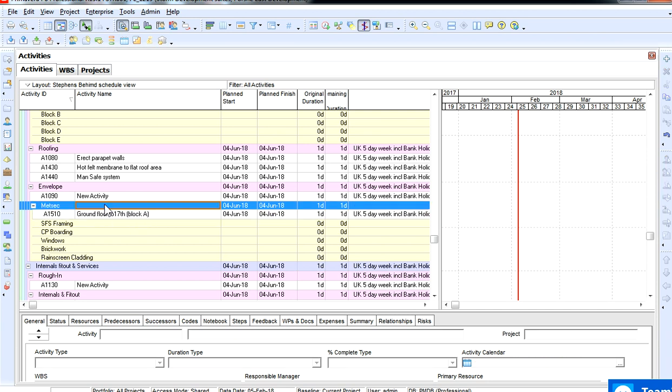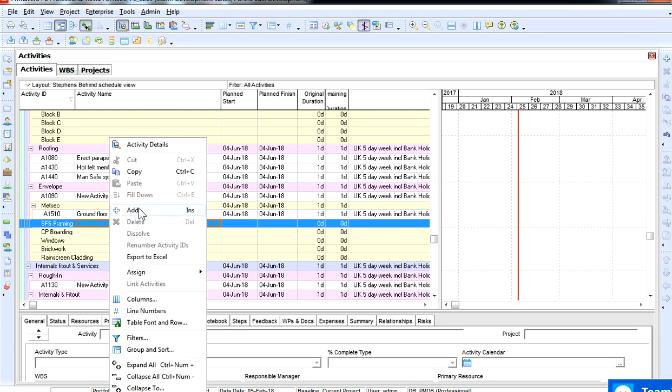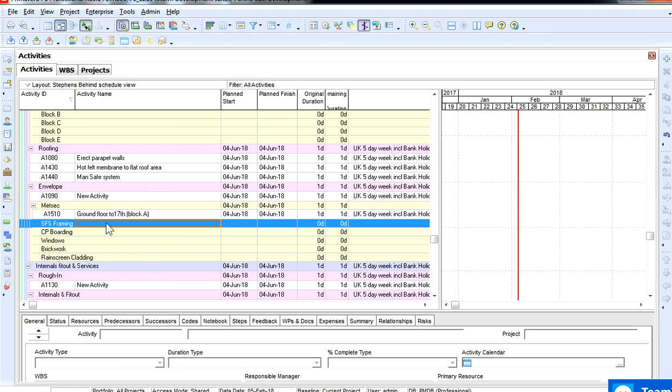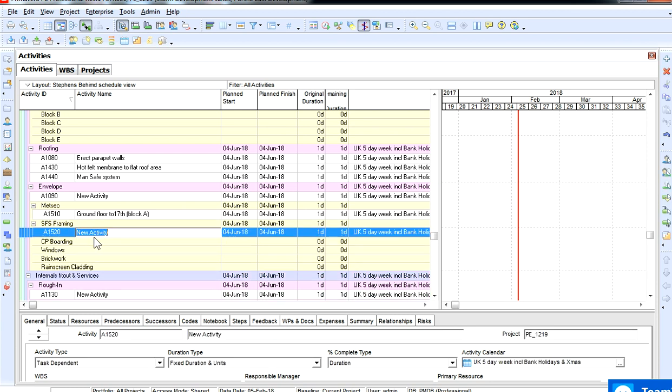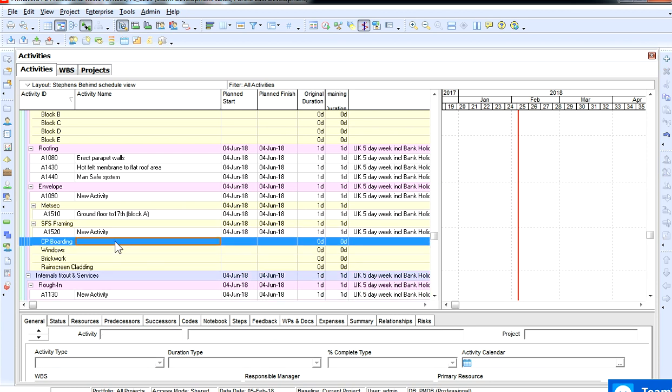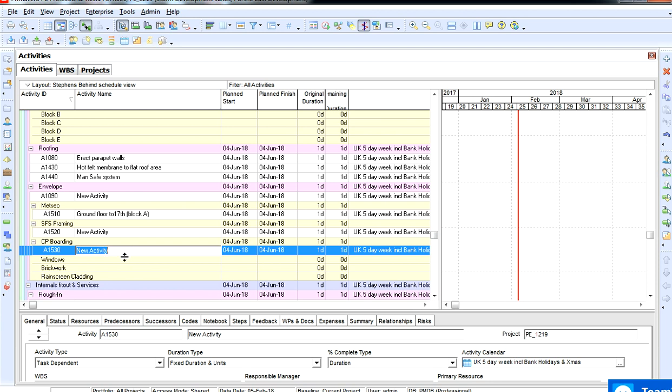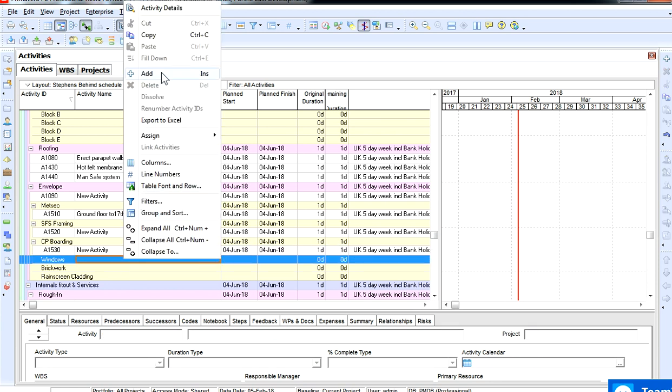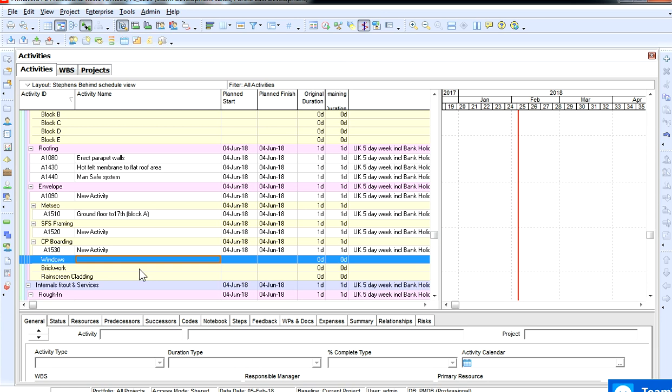So what we really should be doing is the envelope, we should get all of this and divide, create other WBSs. So you'd have a WBS with all of these in it. For block A, for block B, for block C. So each one would have its own because they're all different elements on different blocks. So see each of those blocks as a particular project in itself, a mini project as part of a full project. Okay? Every single WBS for every element of work needs to be defined, and it needs to be populated